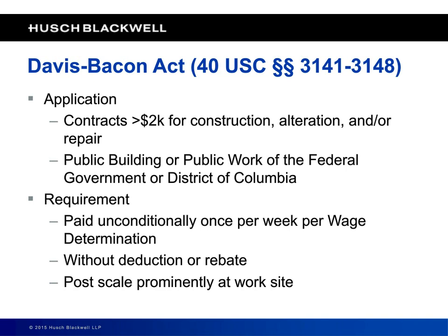Now the District of Columbia government sued, and eventually the DC Circuit ruled that the Department of Labor got it wrong. It said that the Davis-Bacon Act didn't apply to that project because the ground lease and the development agreement associated with that project were not contracts for construction.